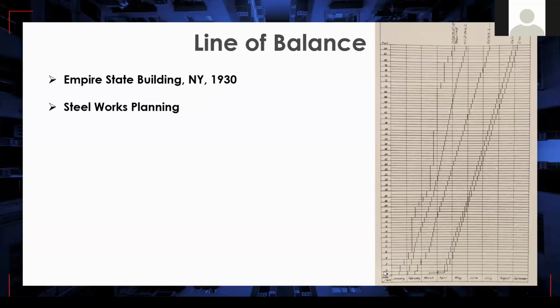Then we are able to see the floors, starting from the basement, 2, 3, going up to the roof, and we have these lines, which determine the line of balance. We are able to track and see the whole project schedule within a single view. Here we have 5 activities: orders, details, delivery, and execution.